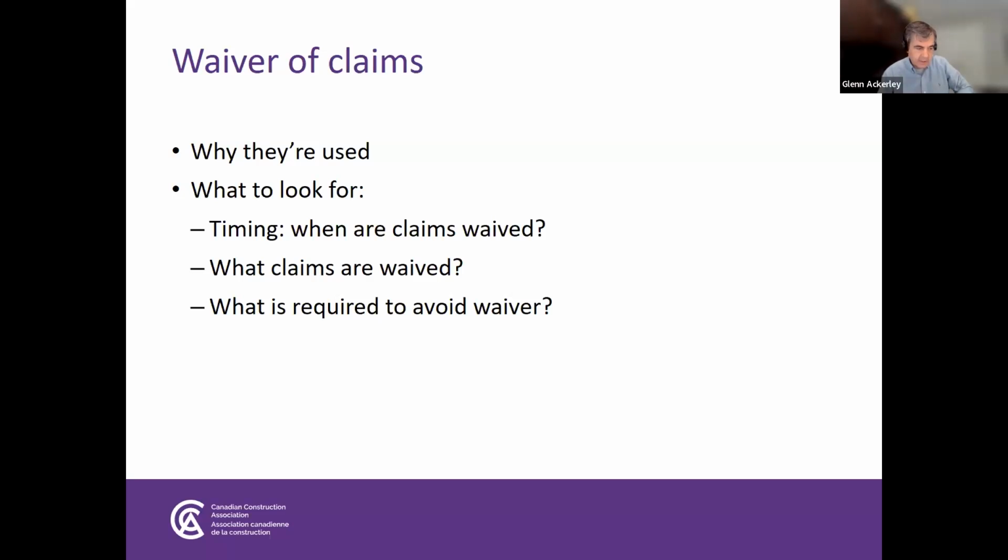Frank, I couldn't underscore enough a very important point you mentioned in passing, and that is notice. Read your contract on this particular topic for when you have to notify the other party in order to preserve your ability to continue to make the claim. Too often, I think contractors just assume that at the end of the job, they can add up what their claim is, how long the delay has been, and then submit it. And they never gave the notice that the contract requires them to have given in time.